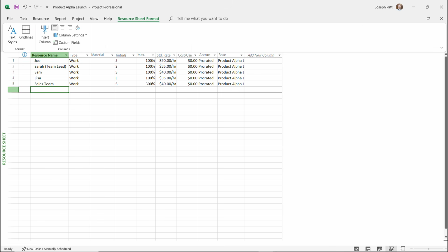Let's do a designer, we'll say. And we'll say that designer is at a flat rate. Let's do a flat rate for this one. Designer, every time the designer works 8 hours, that designer is going to get a flat rate. So let's say $300. And there we go.